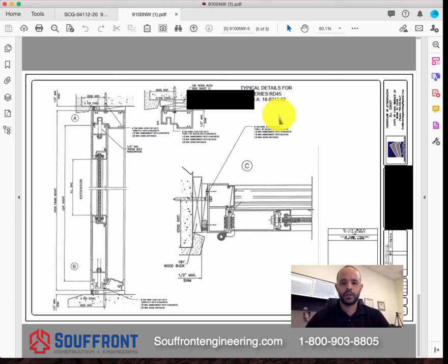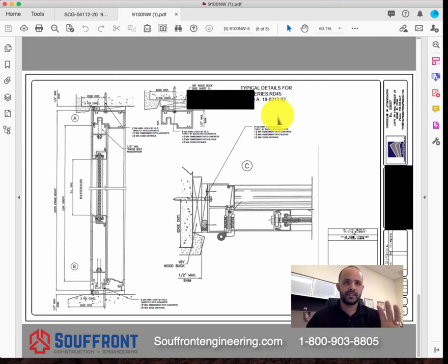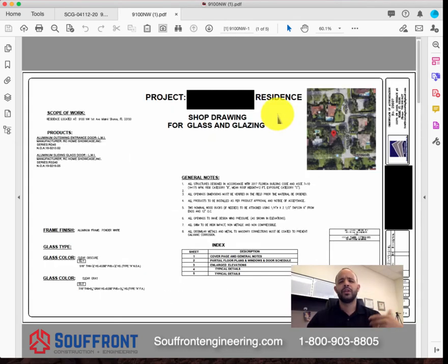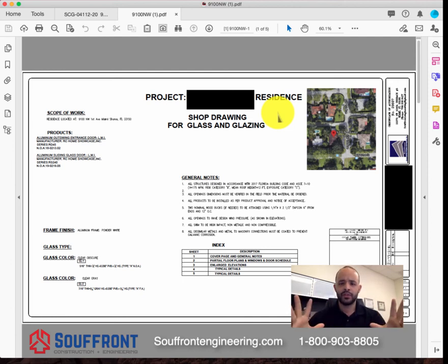You want to make sure that when you submit these drawings to your municipality, they pass on the first time — you don't want to have revisions over and over. A lot of people have obtained permits without adding details like these, but we prefer to include as much as we can to avoid being rejected and avoid having massive revisions. These permits — you're trying to get them as soon as you can so the job can continue.